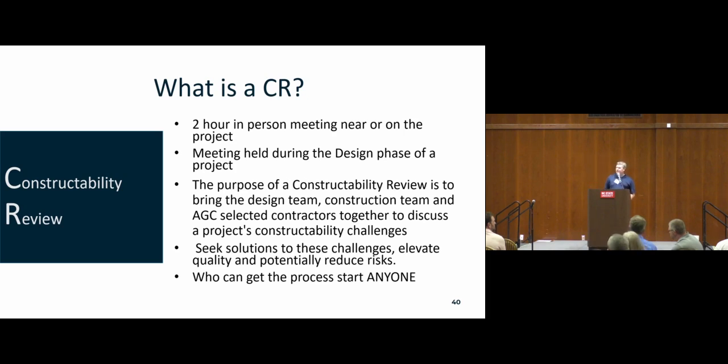And I know when I've been a part of these, there's maybe been 2 or 3 different contractors who might be interested in bidding on the project eventually, but we basically call them in there to give us any ideas they might have, before bid. Like, what kind of issues do you see with this? Is there anything that you recommend as a change or any kind of problem that you foresee? Because we rely on the contracting industry to tell us, is this even possible? Seek solutions to these challenges, elevate quality, and potentially reduce risk.